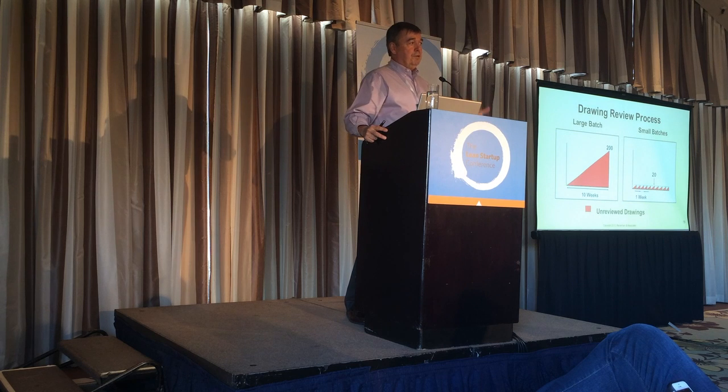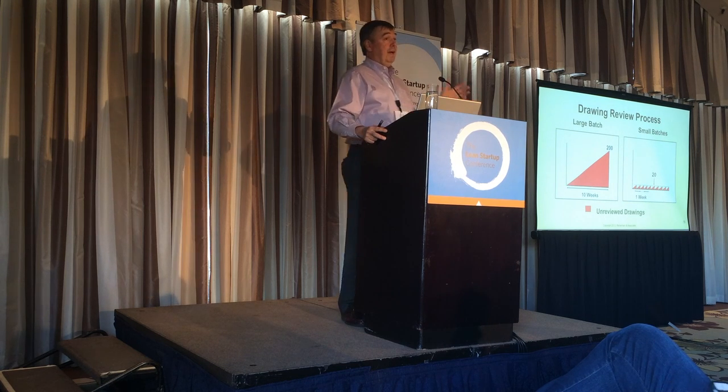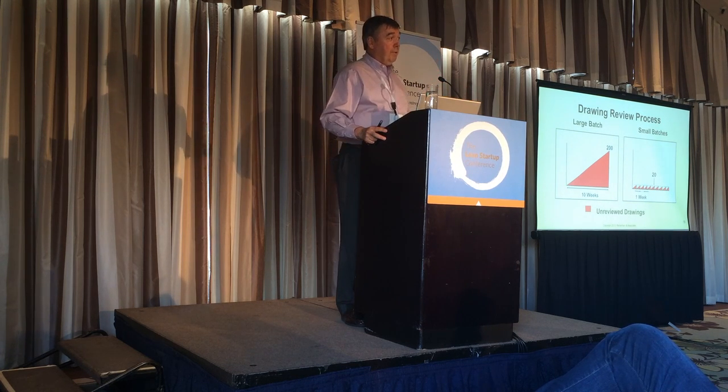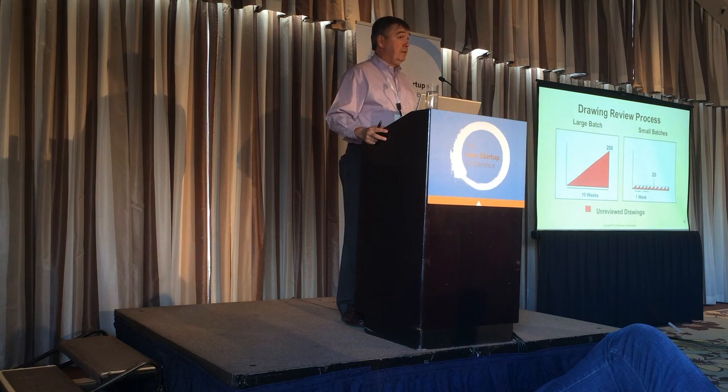Yeah, he said if one drawing depends on another drawing, you find out there's a flaw, you avoid the problem in the other drawing. And that is precisely the right answer. If you make a bad assumption about manufacturing tolerances in your process, you get feedback from the manufacturing engineer: we can't hold that tolerance. You do not embed that mistake in 190 other drawings in the process. It's earlier feedback. Everyone in software is familiar with the value of earlier feedback in processes.